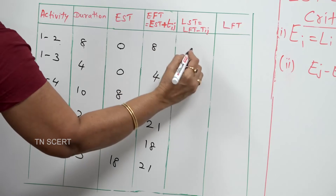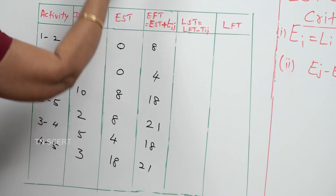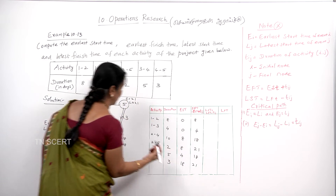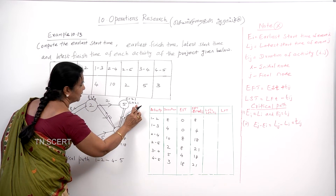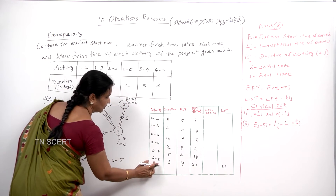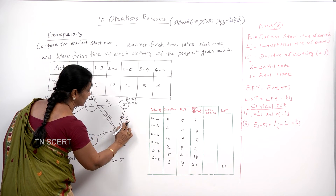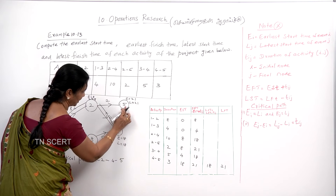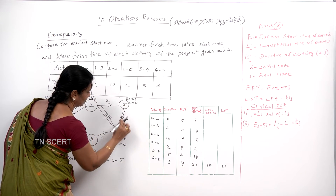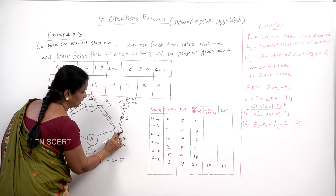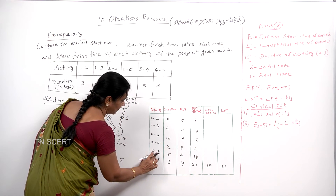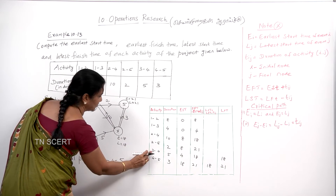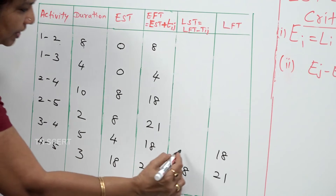EFT is finished. Next, LST — the Latest Start Time — and LFT — the Latest Finish Time. LFT is the latest finish time; LST is the latest start time. Now working backward: node 5 LFT=21. Activity 4→5: we come from 5, LFT=21, duration=3, so LST=18. Activity 2→4: LFT=18, duration=10, so LST=8. Activity 3→4: LFT=18, duration=5, LST=13. Activity 1→3: LFT=13, duration=4, LST=9. Then 18 minus 3 equals 13.